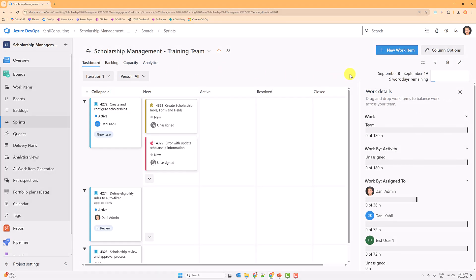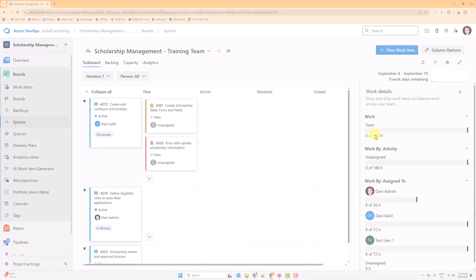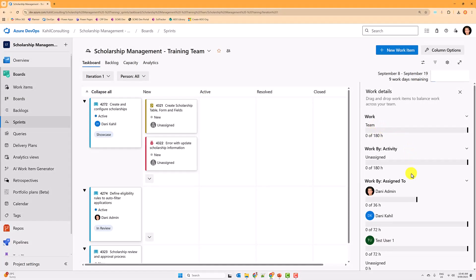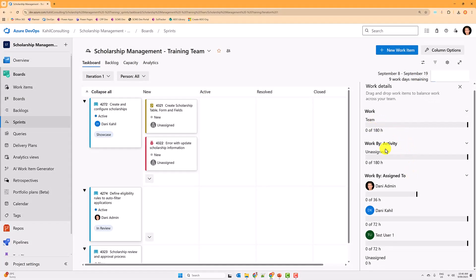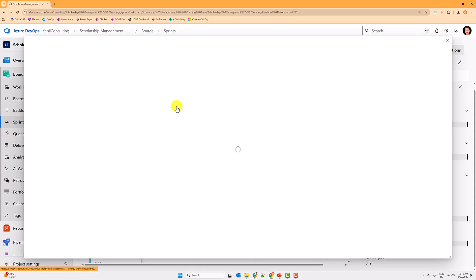Let me save that. Now in the Work Details view you can see how many hours are available for the team, unassigned items, and the work breakdown by team members. Because we have nine days left in the sprint — it started on the 8th of September and we are on the 9th — it shows how many remaining hours are left.